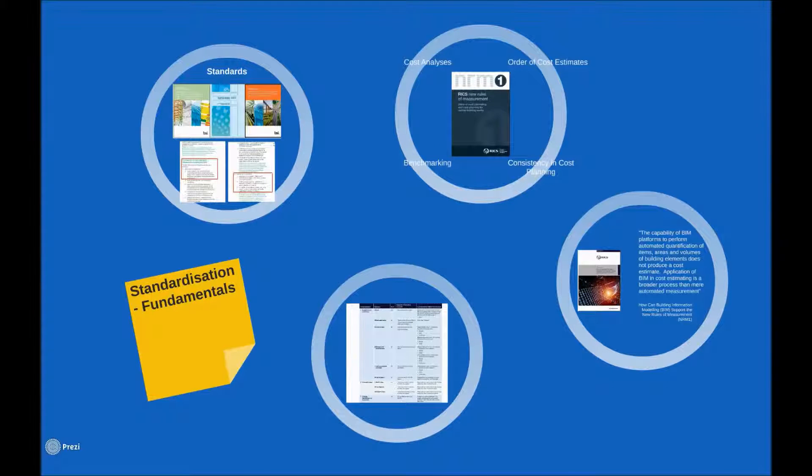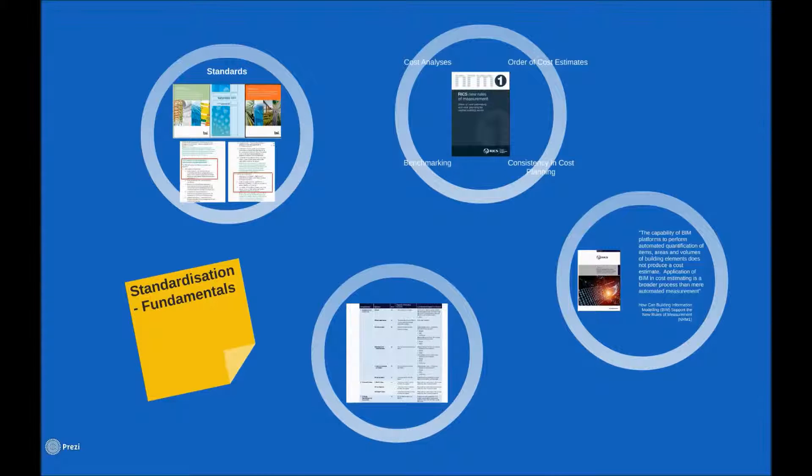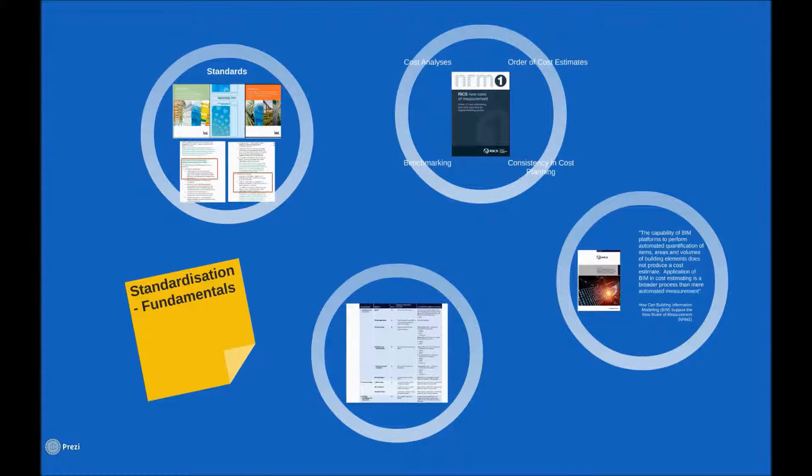In a traditional project a QS might receive design information at various points, possibly following the RIBA plan of works for example. The QS might then issue a series of queries to clarify points of design for the purpose of producing a cost plan. On a BIM project this process can be more formalized.